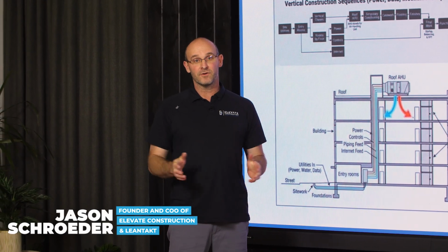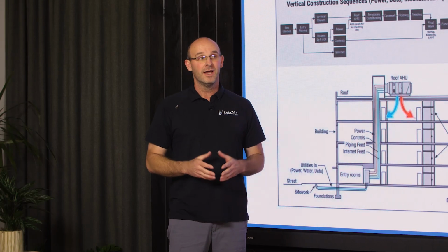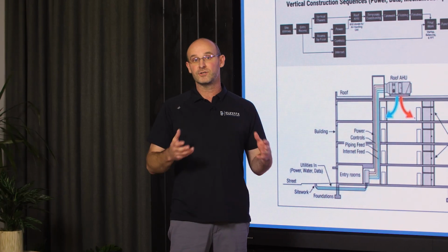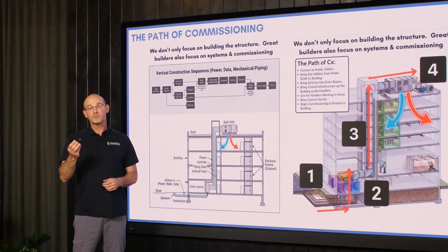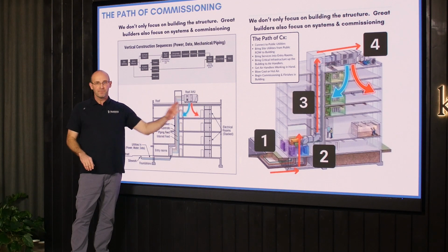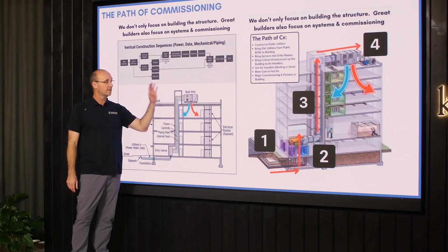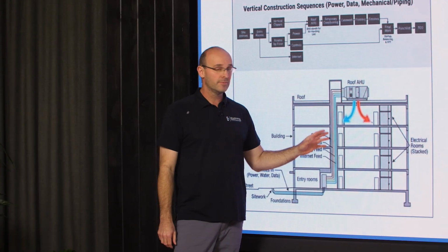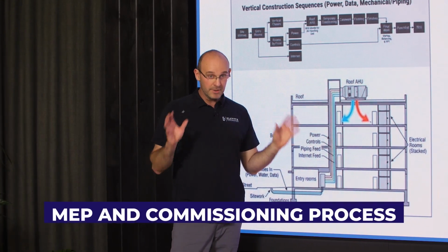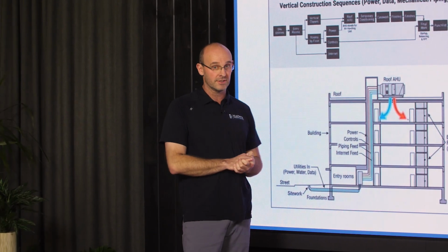This is eating the frog. If you've ever heard of that phrase or that statement, eat the frog, nobody wants to eat a frog. That's gross. They're large. You're going to vomit, but do that first. I also heard a general superintendent one time at Hensel Phelps say, Jason, tackle the most difficult part of the project first. That's why as a project superintendent, I will never delegate this to somebody. I'm never going to delegate this to an MEP superintendent or an assistant superintendent. I'm going to be in charge of the MEP and commissioning process myself because it is the frog. It is the most difficult area of the project.